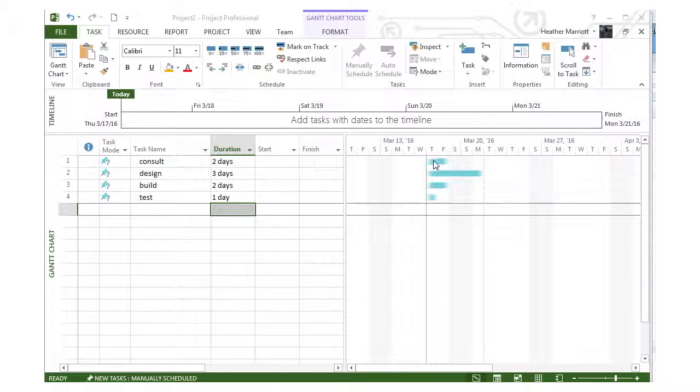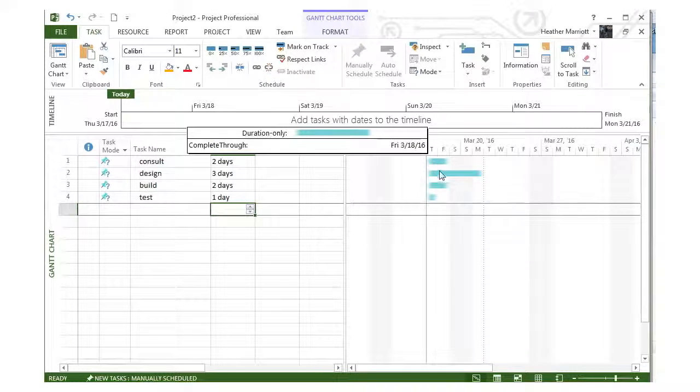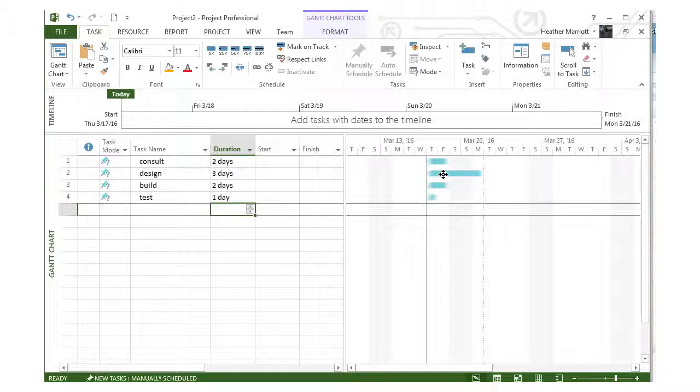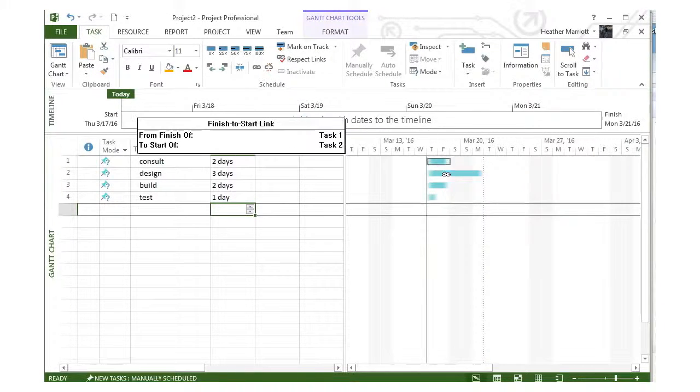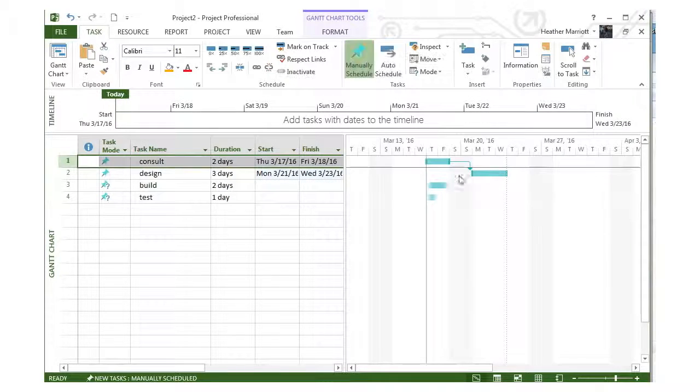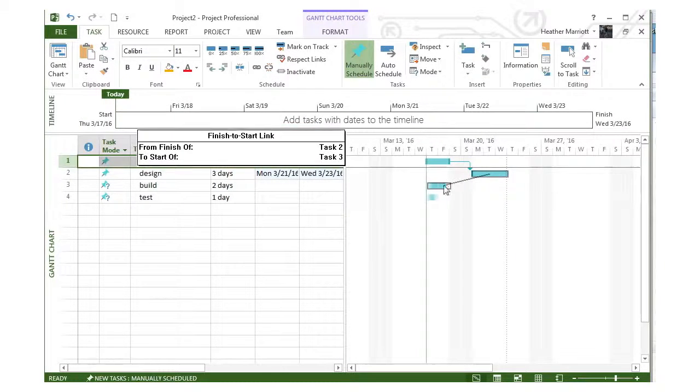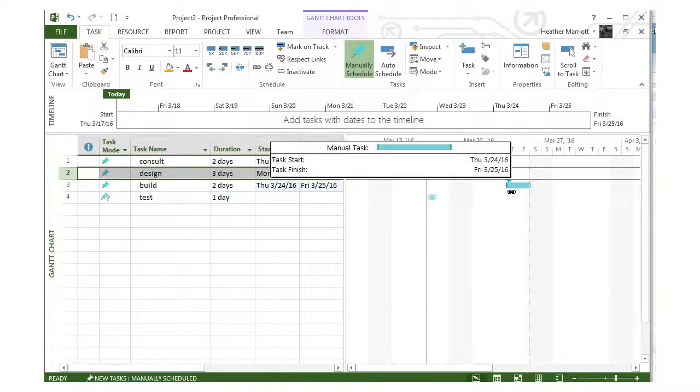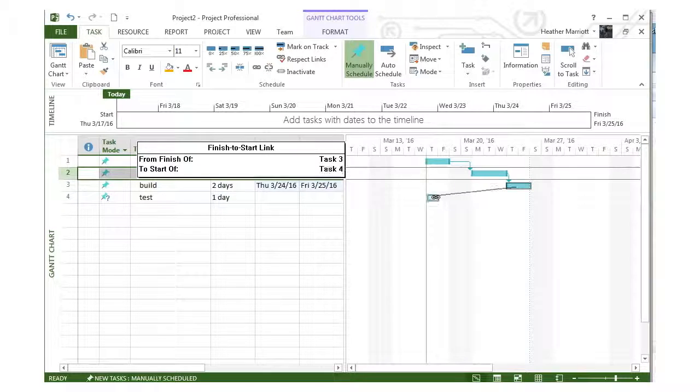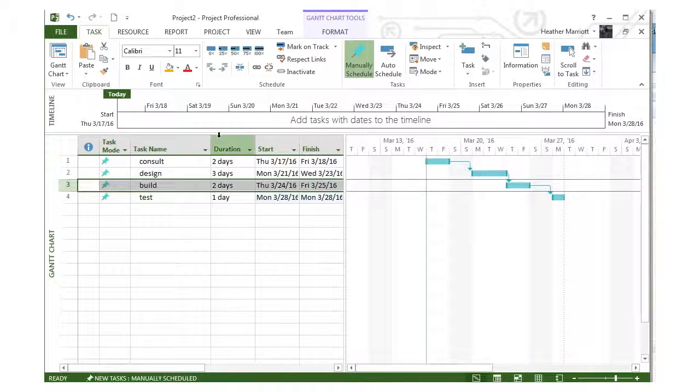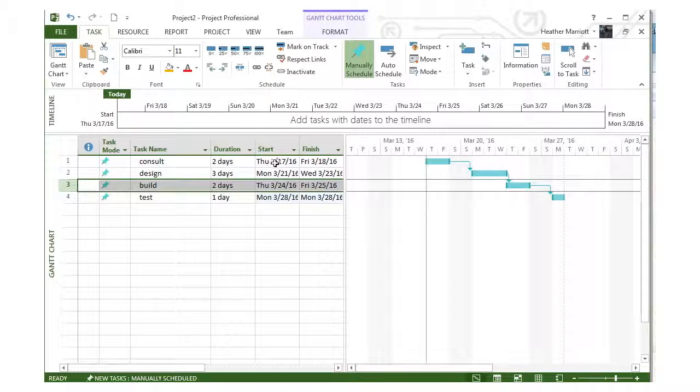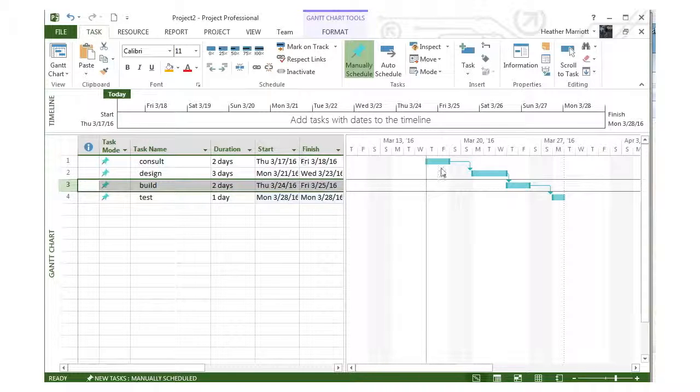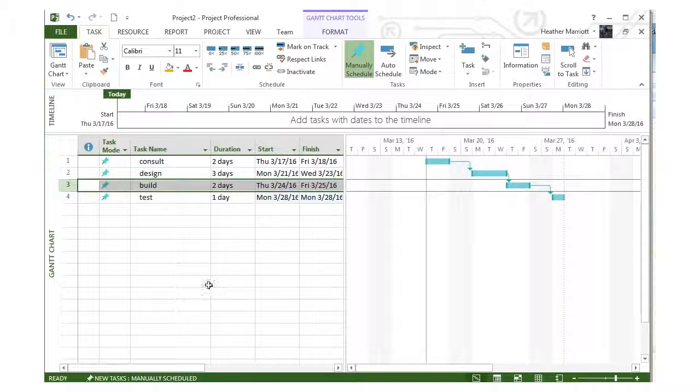Once I assign relationships to these tasks—choosing one task and creating a finish-to-start relationship with another—Microsoft Project fills in the start dates. It uses today's date as the default start date for the first task, then based on those relationships, figures out when the other tasks can start.